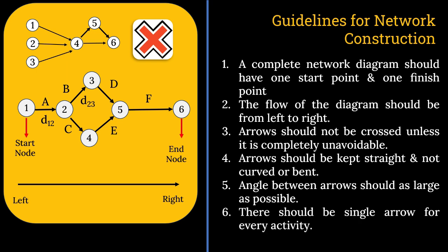There should be a single arrow for every activity. There should not be any double arrow. There should be only a single arrow for any activity. Clear? So these are the considerations.